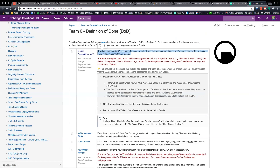The purpose of this is really to have that conversation between QA and dev in more detail than what we can do during grooming. During grooming, we just want to get the basic acceptance criteria up there so we can quickly estimate and go through those tickets. This is where we do a deep dive to really decompose what are the actual tests that need to be run, what are the actual risks in detail that need to be addressed. That discussion doesn't have a time limit — it should take as long as it needs to take.